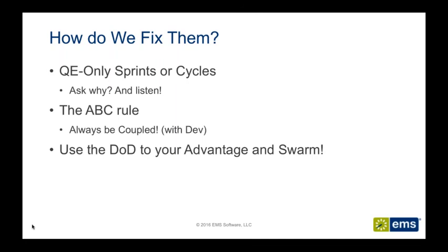So that's why sprint days 3 through 8 are critical for us, because again, we consider those where most of the bulk of the work is being done. And again, if there are more than 2 days that have elapsed where we are not able to support testing or the dev activities by testing with dev, that is considered a flag for us, and we work it through those normal channels. Again, use that definition of done example that I talked about.